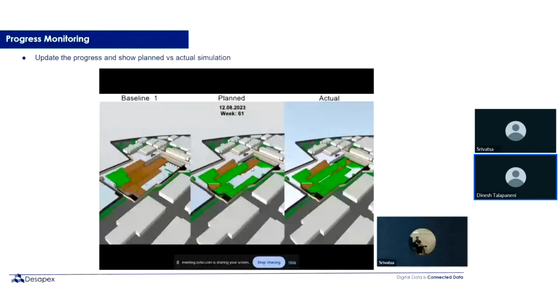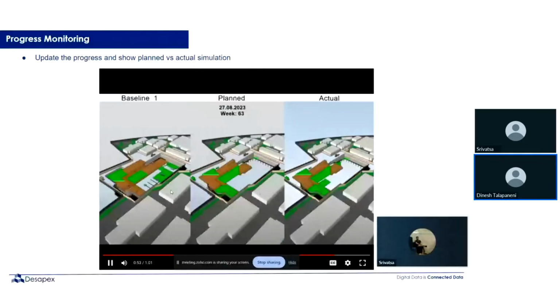This is for the entire earthwork package, where, if you can see, it has been divided into areas and layer by layer, because you need to have those step cuts as well to go with the excavation.